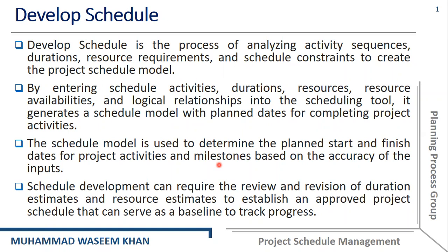By entering the schedule activities, durations, resources, resource availabilities, and logical relationships into the scheduling tool, it generates a schedule model with planned dates for completing project activities.